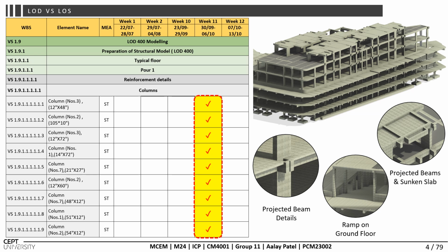They show the timeline for pouring, reinforcing, and detailing of each element. As for the designation of responsible personnel or teams for the execution, structural engineers were identified as the primary authors of the reinforcement details, while on-site construction teams were tasked with the implementation.